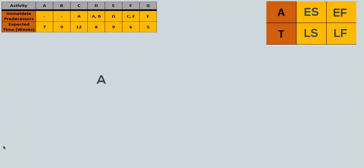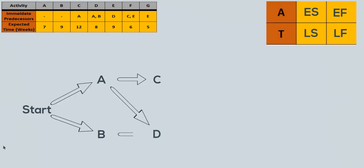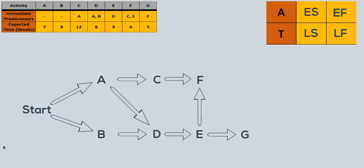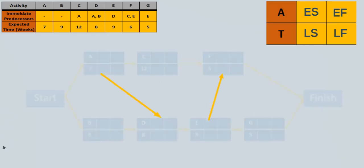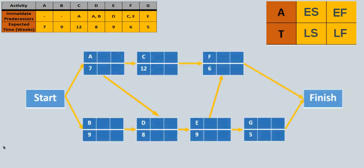Activity A and B have no predecessors, so they can begin at the start. Activity C needs A to be completed before it can start. Then D needs both A and B to be completed. E needs D. F needs C and E, and G depends on E. Since F and G have no successors, they go to the finish. Here is the network with the activity nodes displaying the letters and times.